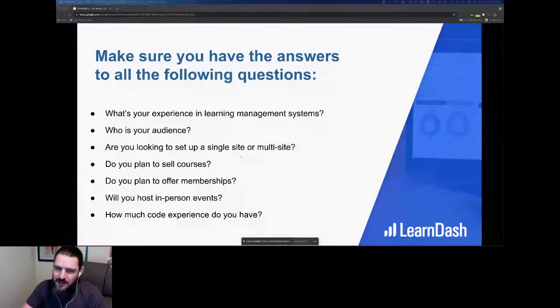Other pages you have to think are now just mimicked over, because you have that, and now you have to design that. So the simplicity of adding a multi-site to separate your courses and your content from your actual main brochure site is great. But all the work that comes along with designing a sub-site, even if you can use the original theme and set up a new child theme, that simple task can easily turn into another week's worth of work.